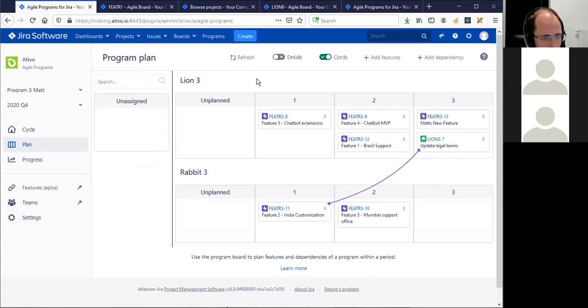Great. So before we go further with the dependencies, it's what you see on this screen already, on my screen. The first thing that we'll discover further is to talk about commitments, risks, and issues, because in SAFe, you can commit features to a certain level. The team says, okay, the feature is committed, or it's a stretch objective feature, or uncommitted as it's called now in SAFe 5. So that's one thing that we can